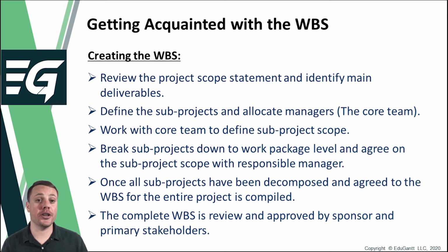The project manager, in consultation with the manager of the sub-project, continues to break down the sub-project until all the deliverables, which include the main deliverables and the intermediary deliverables, are defined and there is consensus regarding the scope of the sub-project. Once they are in agreement regarding the detailed scope of work up to the work package level, they further collaborate to determine the estimate time, resources and cost of the sub-projects. This is, however, usually done as part of the processes that belong to the schedule and cost control knowledge areas, and as such we will not be going into more detail regarding these aspects in this course.